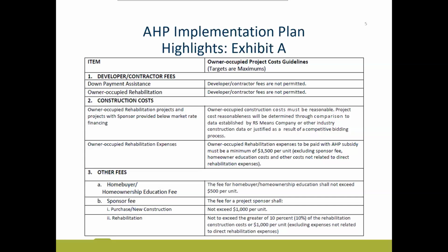Feasibility workbook, which we'll cover here in a little bit. It is a workbook that you'll fill out with every disbursement request. It goes through the different fees, and it will flag anything that is over guidelines. So you will be able to see that within your feasibility workbook if you run into any issues.